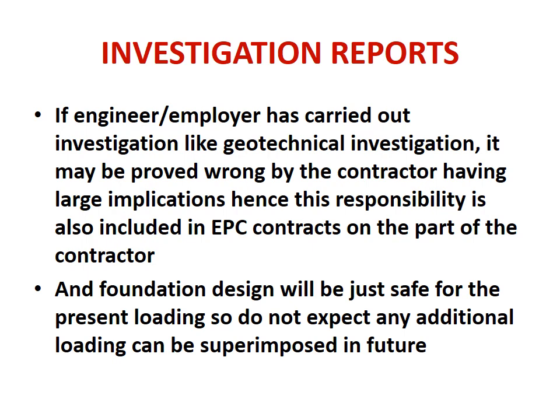So there will be disputes, and such disputes may have large implications in the end. Hence the responsibility is included in EPC contracts on the part of the contractor. But then the foundation design will be just safe for the present loading, so do not expect that any additional loading can be superimposed in future.